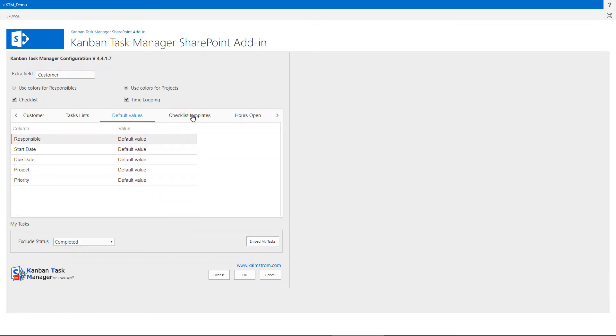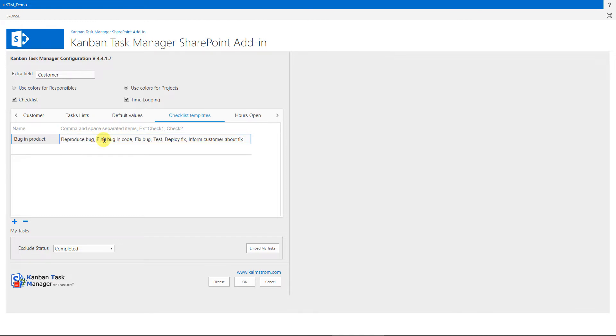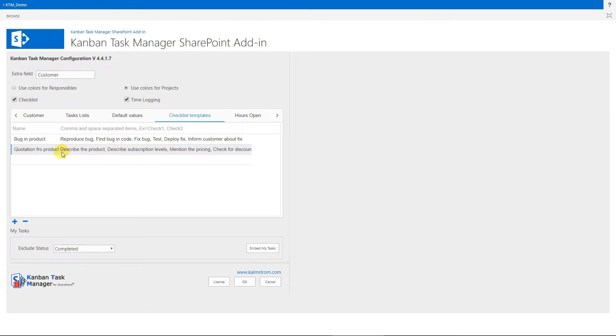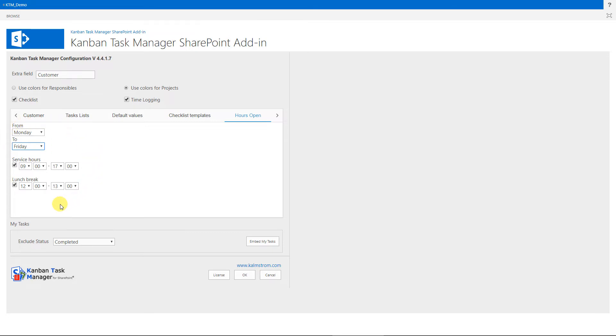Under this tab, you can add templates for checklists with similar steps. That way, the users can select the template instead of writing a new checklist each time. Under the Hours Open tab, you can define your organization's working days, service hours and lunch breaks. Based on these factors, Kanban Task Manager will calculate the total hours a task was open. Please refer to the manual for a detailed description and clarification on how this feature works and calculates time.